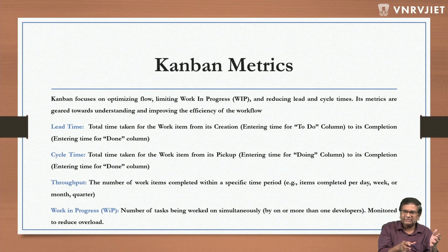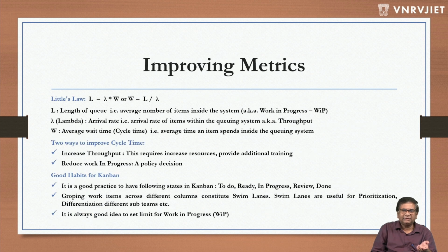It's too much. It will be too much. Maybe 4 tickets is fine. Then put a WIP limit: okay, more than 5 tickets cannot be worked on. 3 tickets cannot. It depends upon the need and company policy. So these are the different parameters that are used in Kanban.